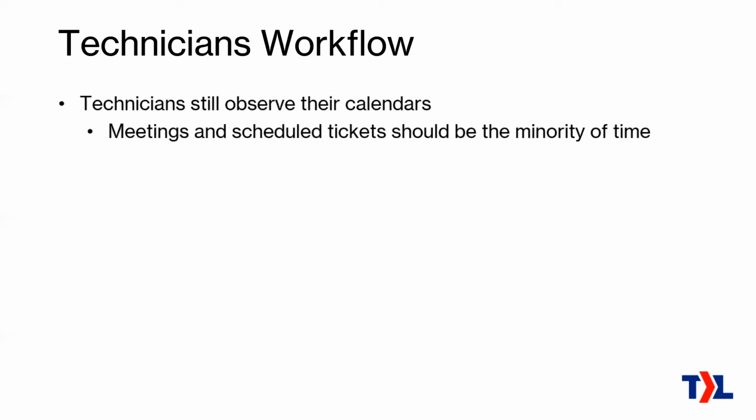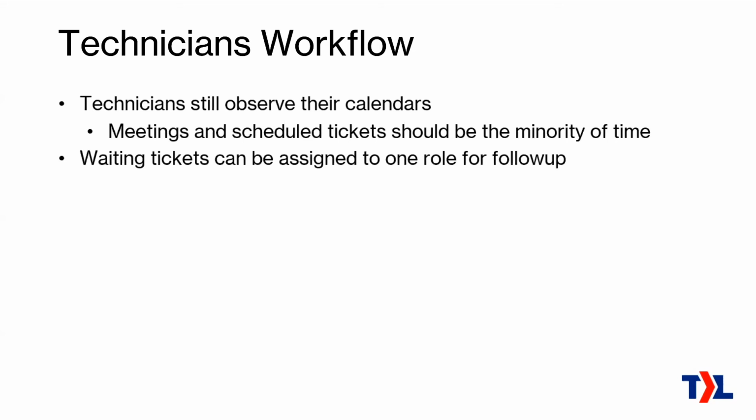Whereas with Kanban, the meetings and the scheduled tickets should be a minority of their time. So their calendar is actually mostly free. It gives them the bulk of their time to get through the work on their Kanban board. But they still do watch the calendar. If a meeting comes up or a scheduled ticket comes up, then they stop what they're doing and they work on what the calendar calls for.